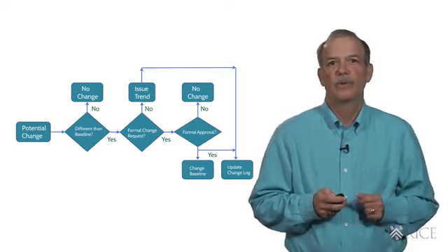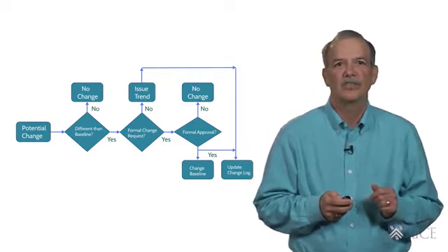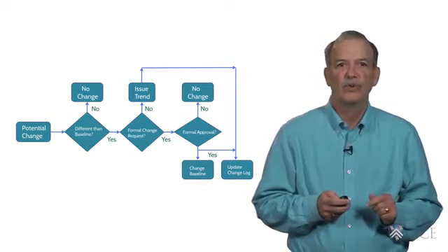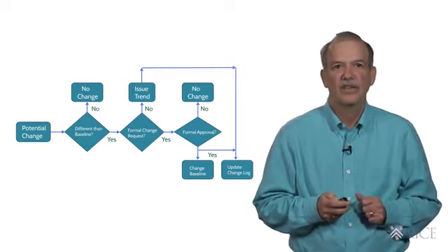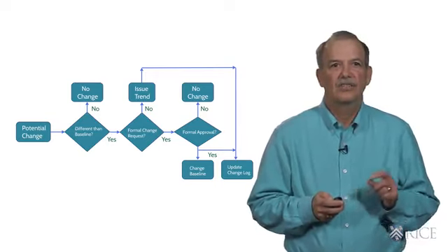If there was a formal request for a change, then we seek approval from the authorizing agent to change the charter or other baseline documents previously agreed to. If this change is approved, we will issue a change order documenting the approved change, modifying the baseline documents, and adding change to the change log.